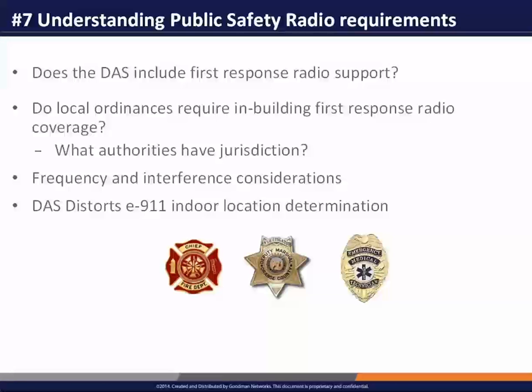At the same time, like the discussions with the carrier, it's important to understand at the municipal level what's coming down the pipe so that you're prepared for that. They may not have an ordinance now, but you may discover that they're planning one. So now is a good time, when you're designing the DAS system, to consider, say, pulling in spare fiber, considering alternative antenna locations, all the things related to meeting the unique requirements.